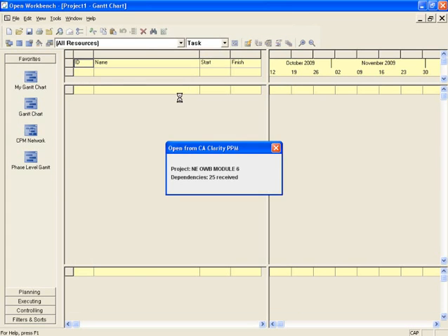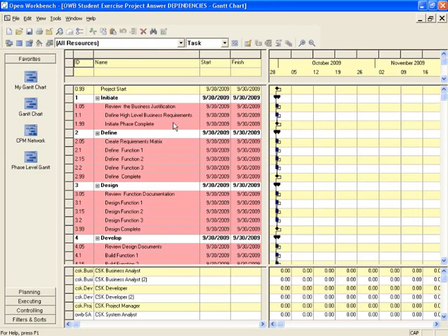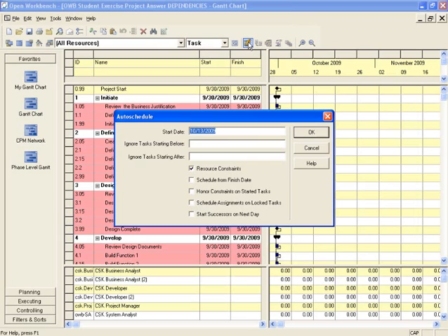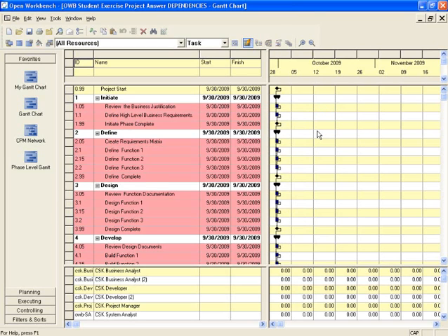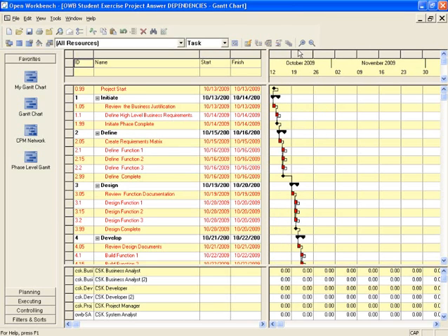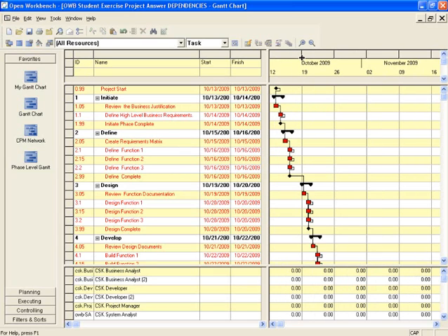You'll see it go through the opening process here. And then right now, as we left it in Module 6, the dependencies are there, and of course they're all showing with the dependency violation. So I'll do like we did in the last module. I'll do an auto schedule and just do it in the step of releasing the dependency violations, and they're all gone, and we can actually see how these are sequenced out.